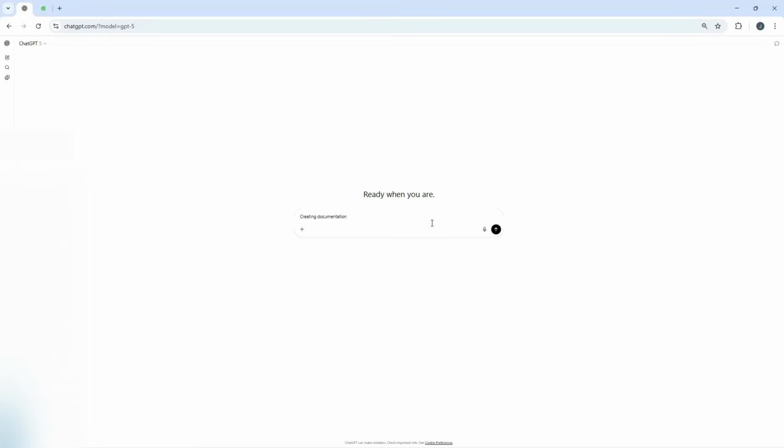The other thing that you can do is say something like, suggest me the columns I need to include, or what would be a good way to create a project plan for this. So you type all of that in. Now, the other thing I want to mention, because I did briefly touch upon it there, is you can add files. So it could be that you add a copy of an Excel project plan from your organization, and just say something like, this is a previous project we ran. I need something similar, but obviously updated for this particular project. And you could provide project specifics. If your company permits it, you could put in the project charter, the project brief, and say, create a project plan from this. You get the idea. So you could add that. It could be a PDF, it could be Excel, etc.